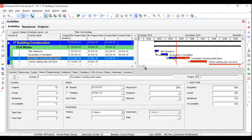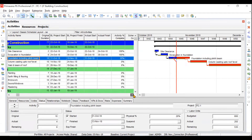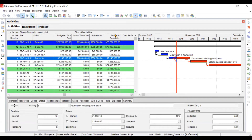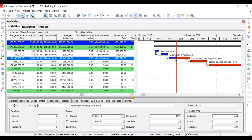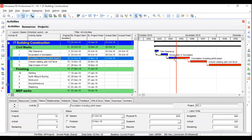You can see budgeted units, actual units spent, and remaining units. This is how we update the status of our activities and perform earned value analysis. The columns show actual cost, budget at completion, CPI, cost variance, and earned value cost. We will understand these key parameters in the earned value analysis video to know the health of our project — whether it is on budget, ahead of schedule, behind schedule, over-budgeted, or under-budgeted.